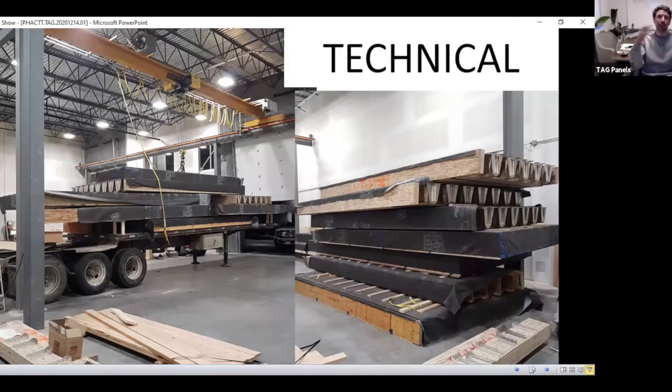As Shaun said, we have to build everything backwards because the last panel off is the last one we install. And I think anyone who's a builder or a carpenter, these guys are so open to this new way of doing things, and the care they take in their normal work is really showing here when we say that we have to lay the panels carefully and wrap everything and seal really tight. It's been really amazing to see them step up and own this process. And they have to have a much more holistic view of making the panel, whereas some generals would subcontract a framer. The framer comes in, does their work fast as you like, and gets out of there.